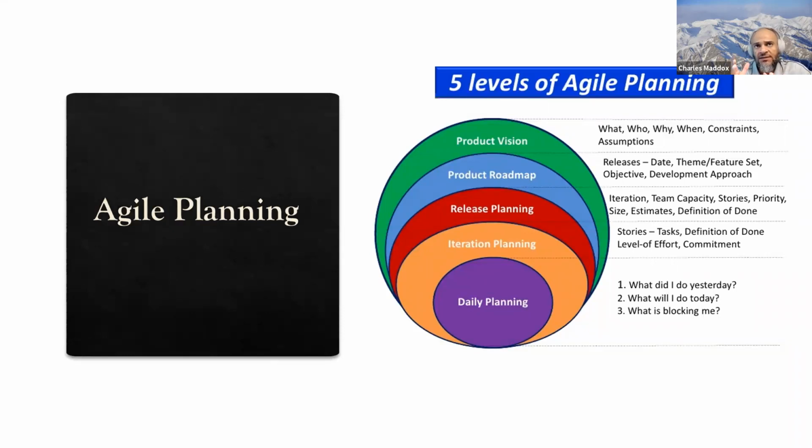But in order for us to get into the details of how we're actually going to deliver on this, we need to go one level down. That's where we kick off what is called the release planning phase of your traditional agile planning onion. That's where we start to meet the compliance requirements of DO-178 and CMMI, typically at this release planning level. Further down into the details, like code deliverables, release deliverables, and change requests, those are more handled at the iteration and daily planning levels, and we're going to get to that in a second.